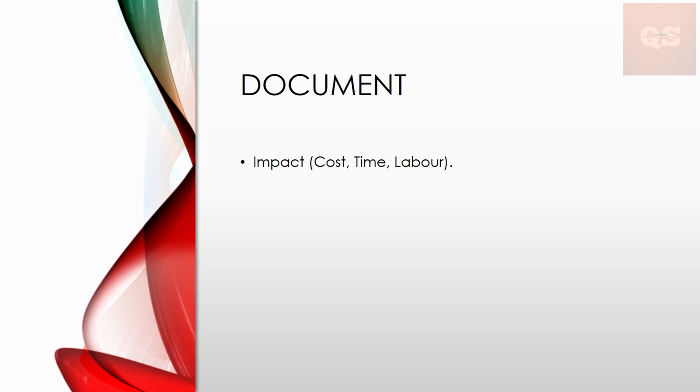There would be an initial base timeline, and if at all this particular new scope of work would extend our initial project completion date. So all these need to be analyzed and worked out. A costing should be done, a timeline should be worked out about how many days are required to complete this work, and whether this would affect the original scope of the work and the original timeline of completion of this project.